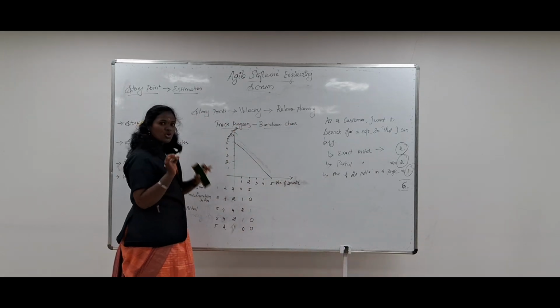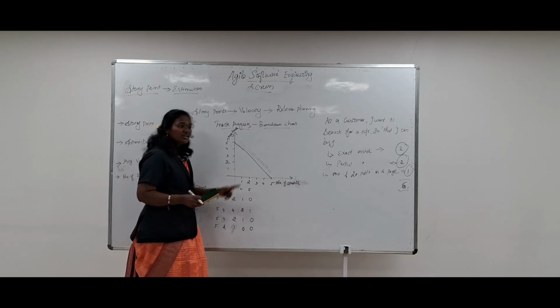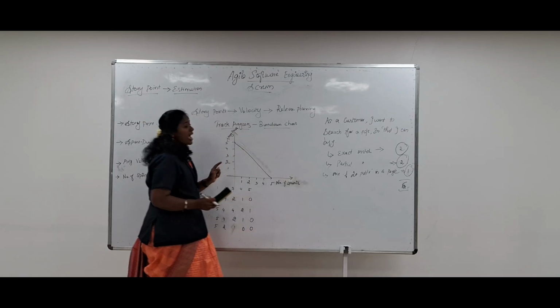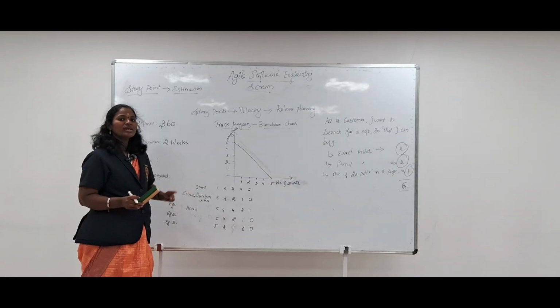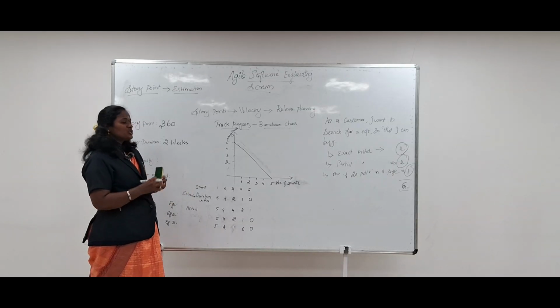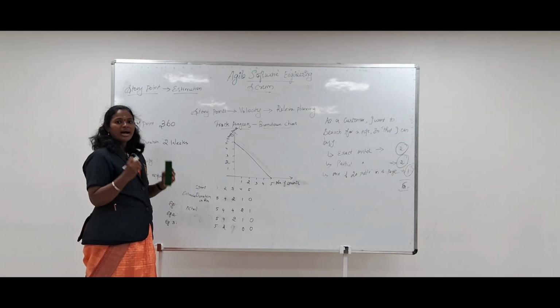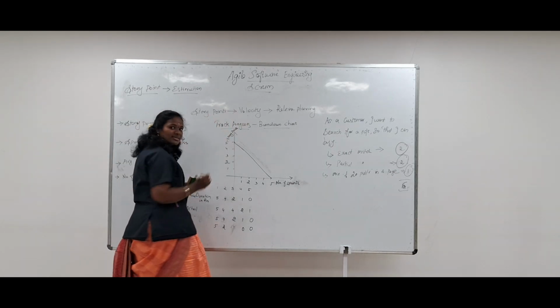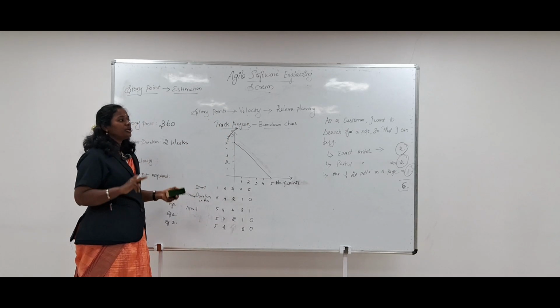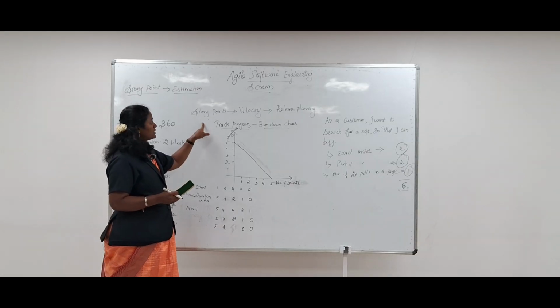We have seen here how to calculate the story points. Now, the story points are only for requirement analysis, for the requirements alone, which does not calculate the effort. So we need a metric that converts the story point into velocity, so that it can be converted into effort. This is the main thing we need.